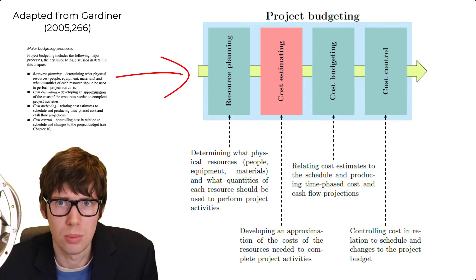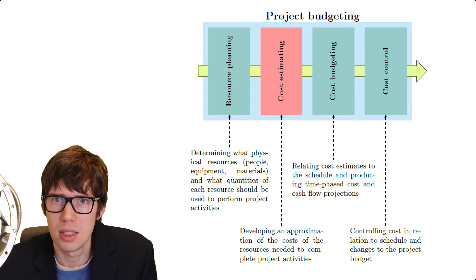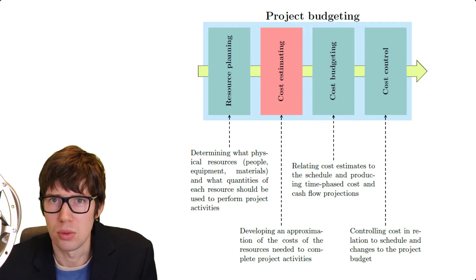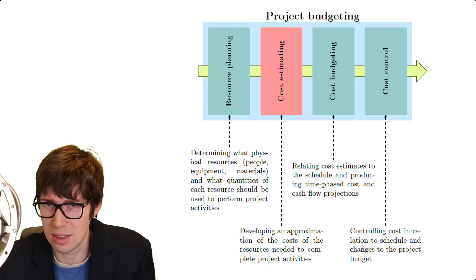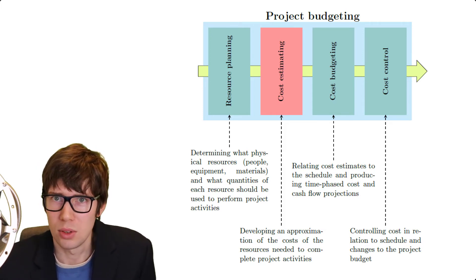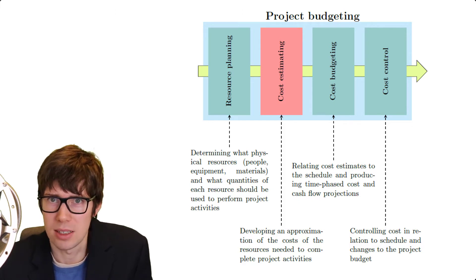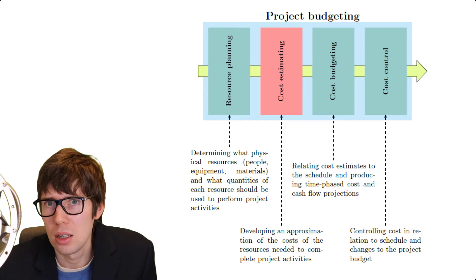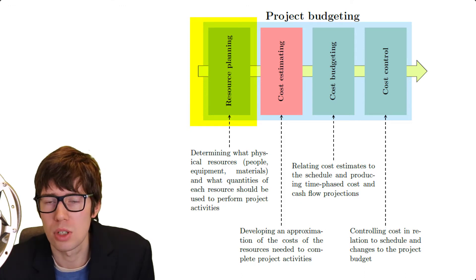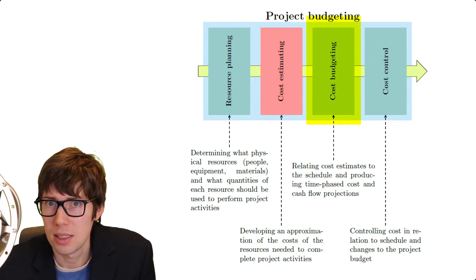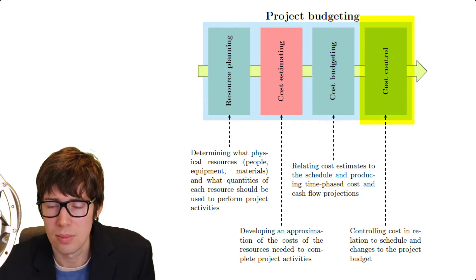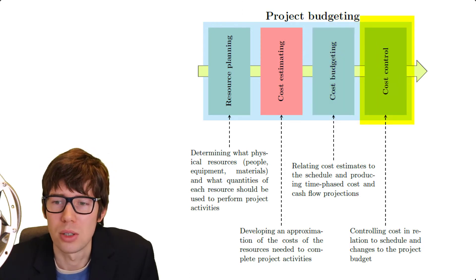Let's get straight to the point. Project budgeting consists of four distinct phases. The names of these phases vary a bit from source to source, but there is pretty much agreement that there are four phases in a particular sequence. According to Gardner 2005, these four stages are: first, resource planning; second, cost estimation; third, cost budgeting; and fourth, cost control.